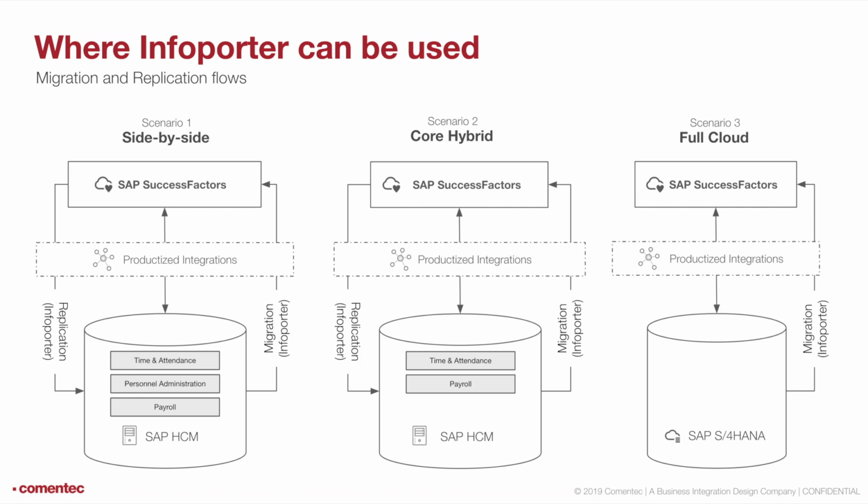The reason for that is that when you're doing payroll and HR together, you might stretch your team too thin. So depending on your complexity, it is advised to focus on moving the core HR first and then focus on payroll and other modules like time and benefits and all the other ones that are out there.